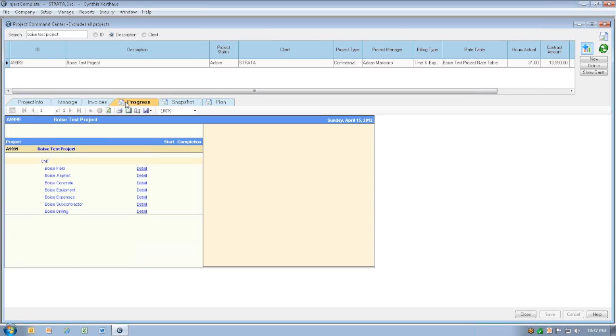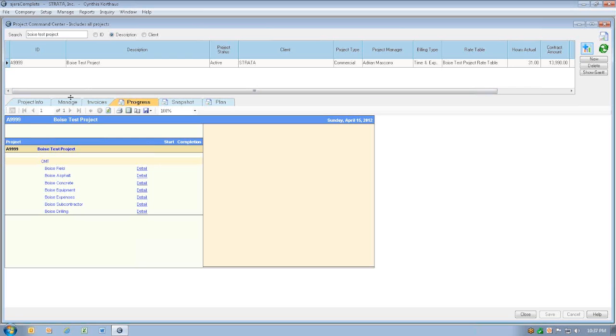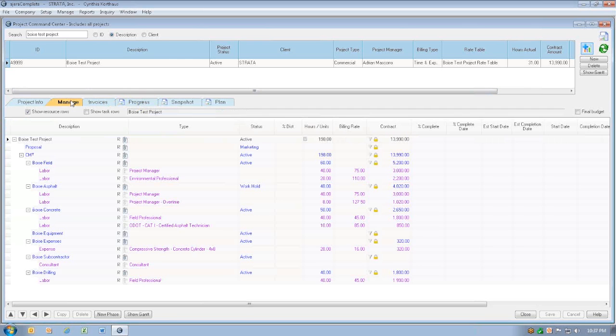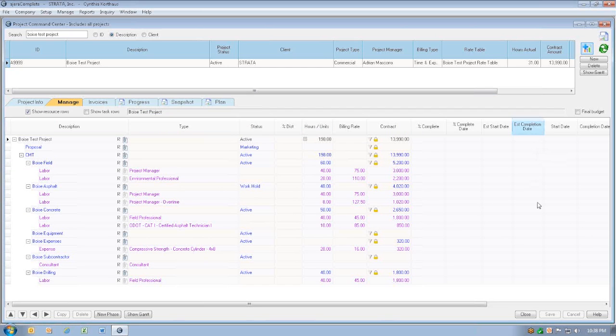What we need to do is fill in the start and completion dates. Because these columns are blank, we don't have a good idea of what the progress should have been. To complete these fields, we're going to go back to the Manage tab. On the right-hand side, we're going to fill in the estimated start and estimated completion dates.